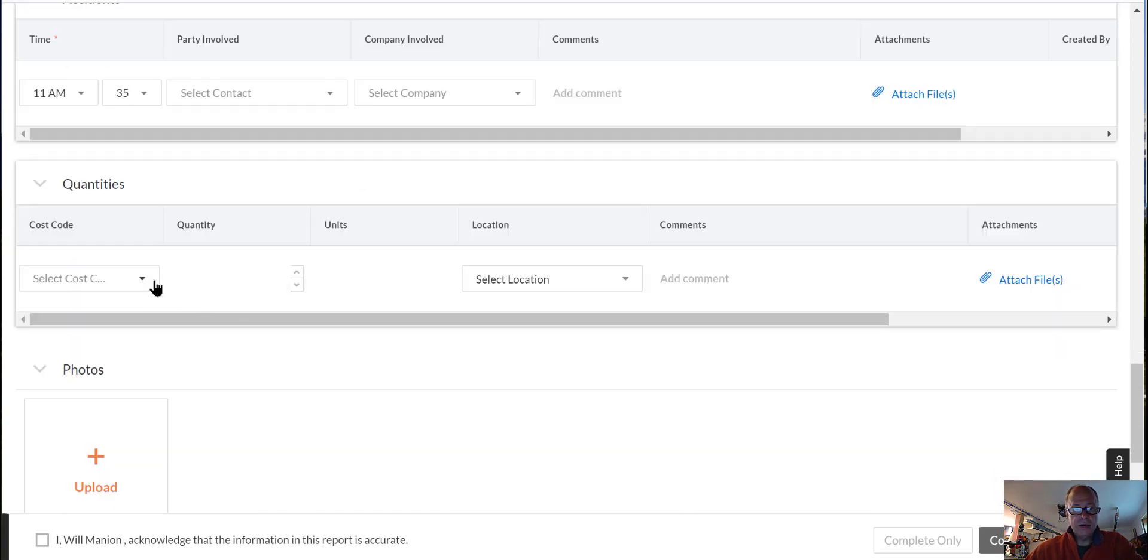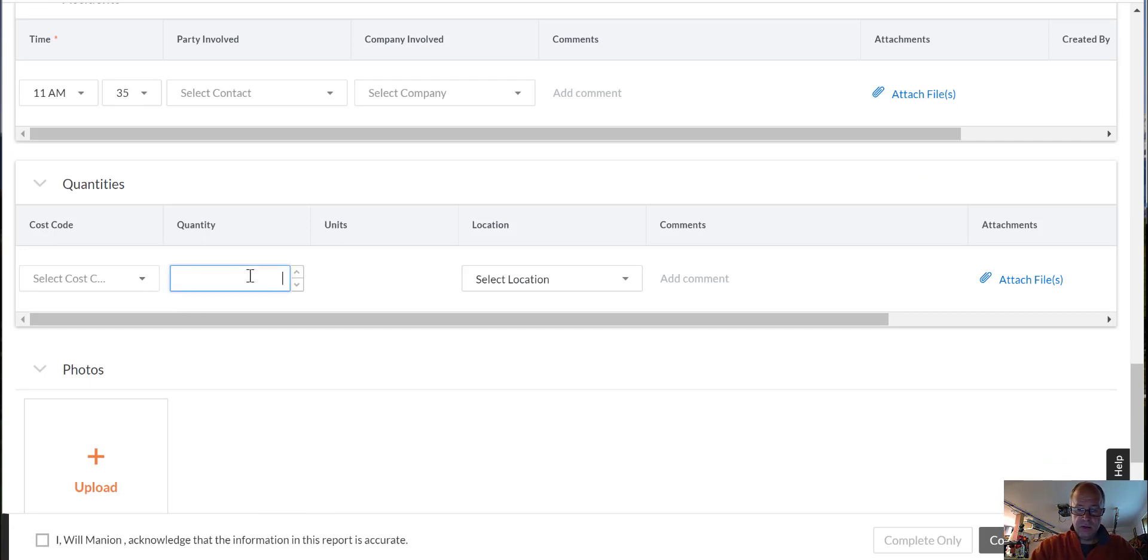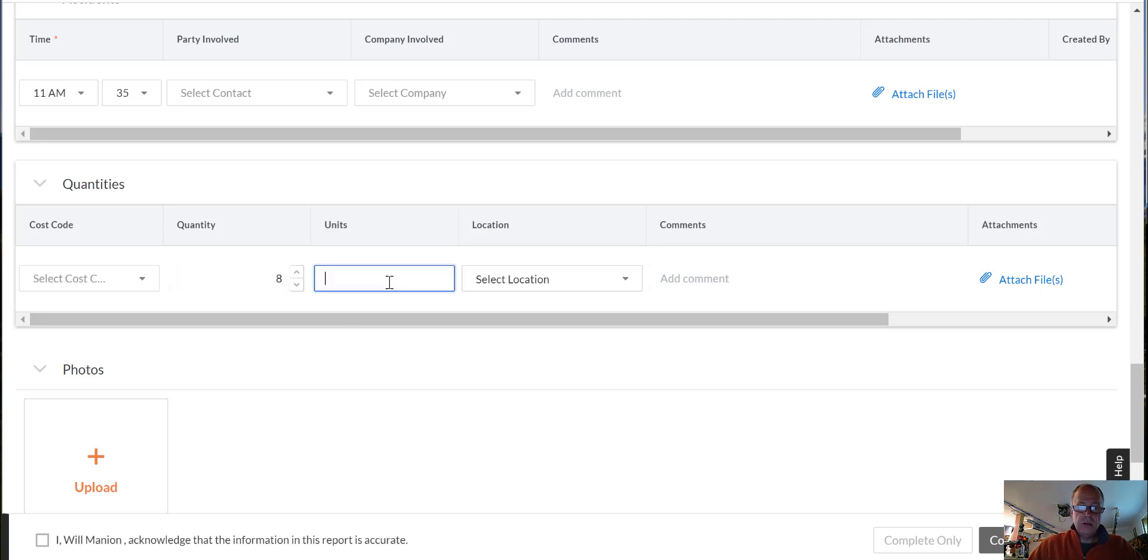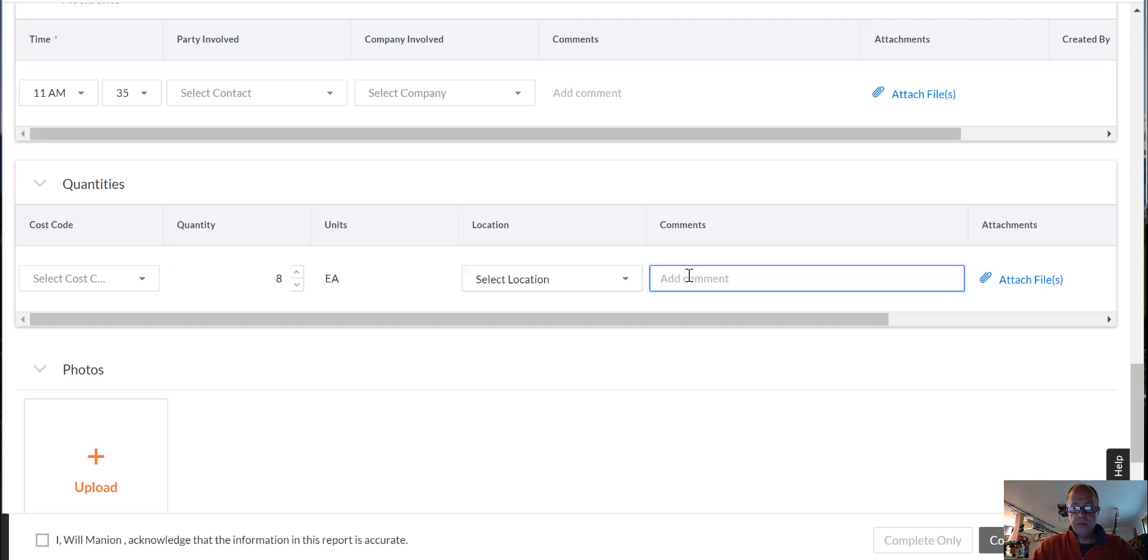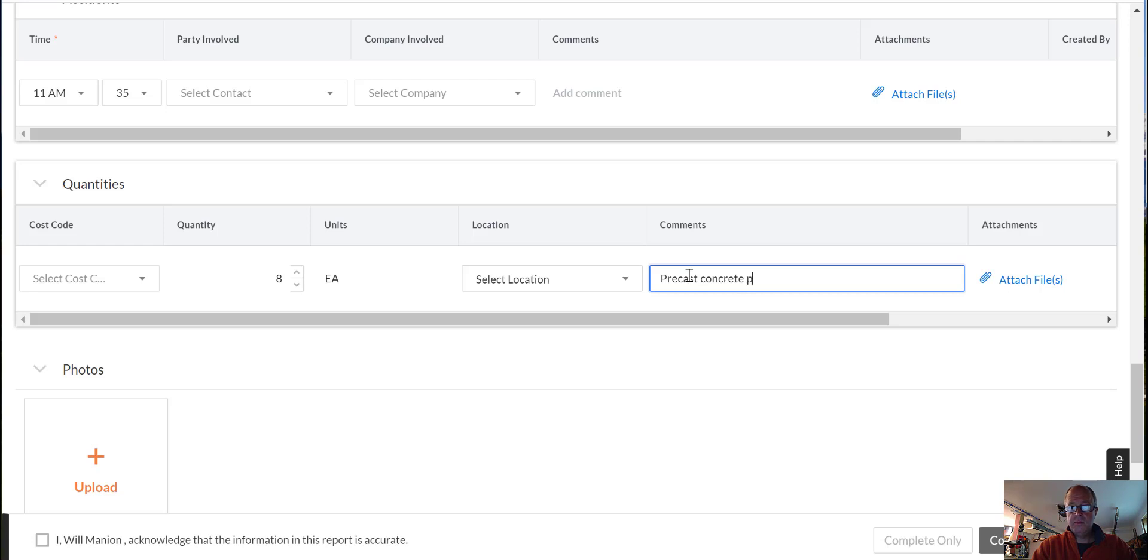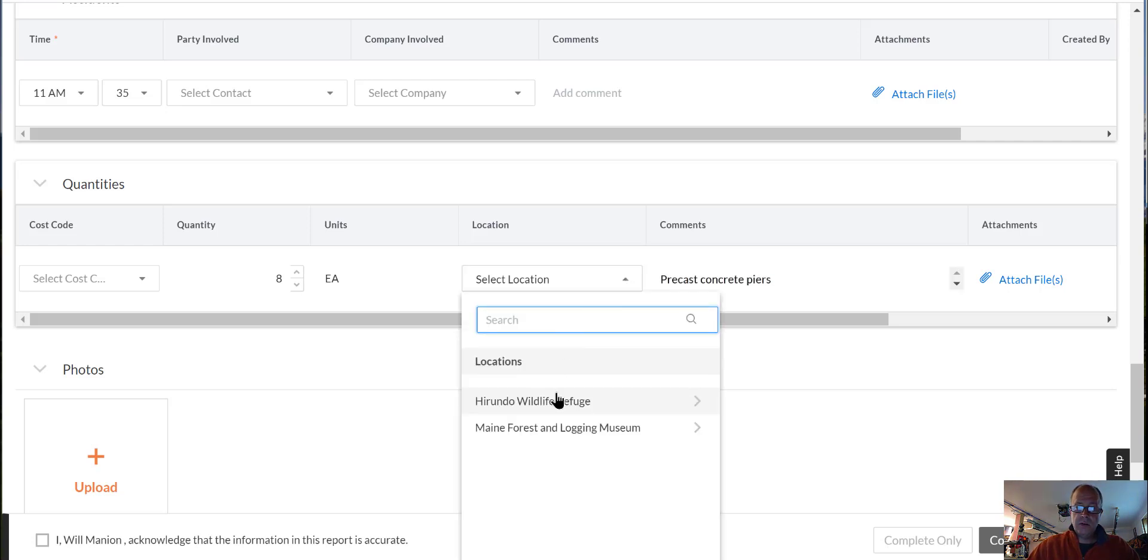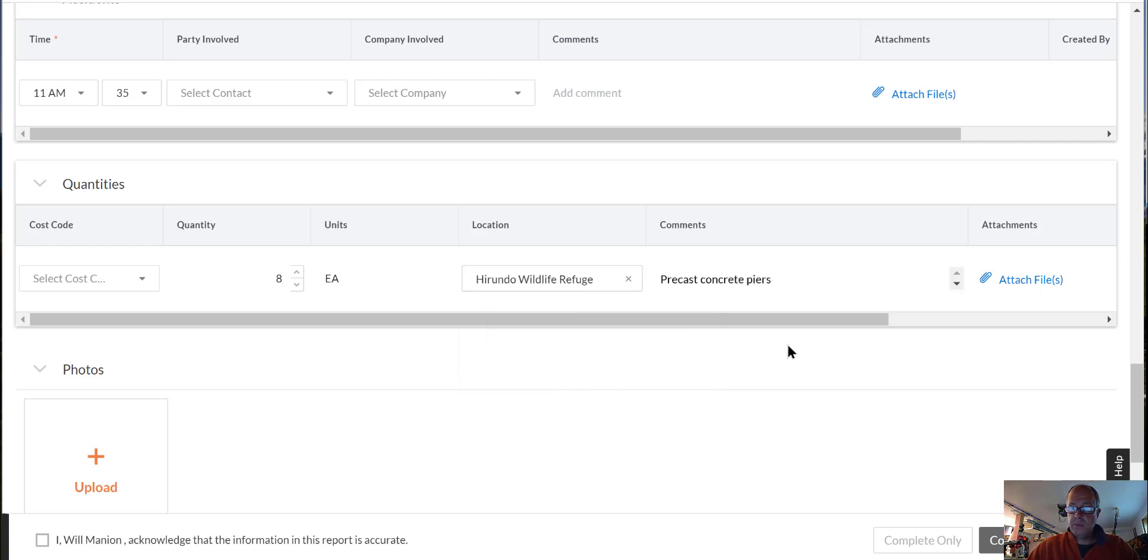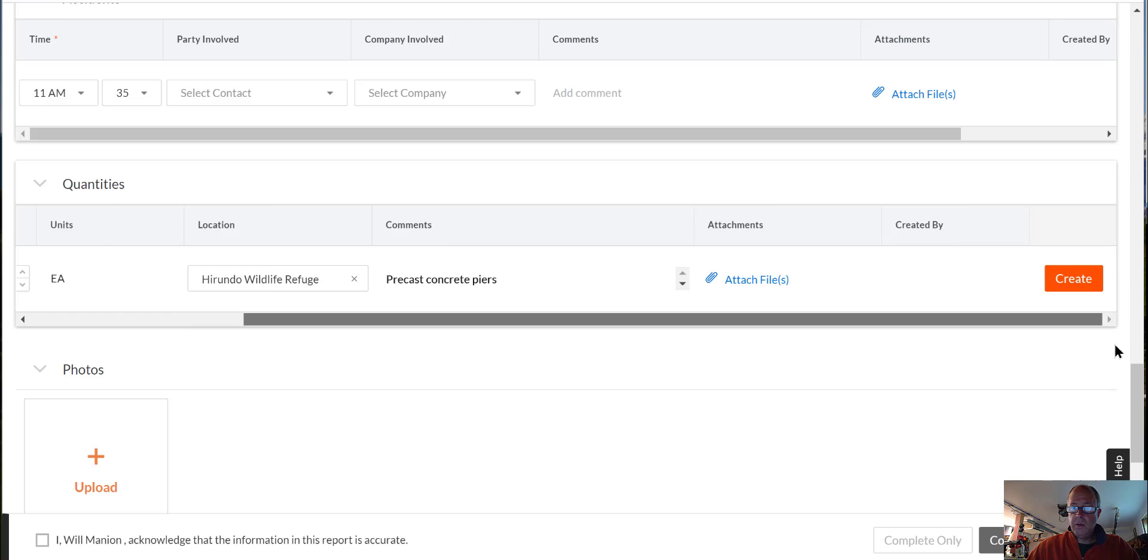Quantities. So it would be good to put in some quantities. Like we put in, let's see, it was eight each of precast concrete peers. If I could type and that was at Herondo. Save that one.